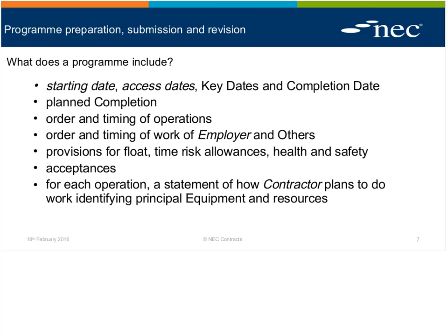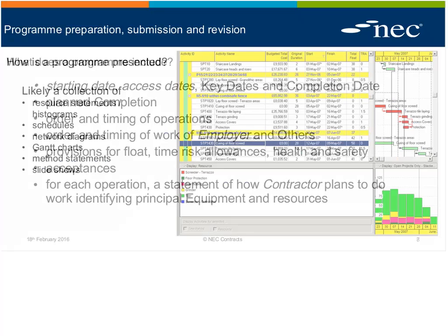On day one of a 2-year job, are you really going to know the nuts and bolts? How are you going to know, for example, the fencing? No, but if there's a piled retaining wall in the 100th week, I think we should know whether there's one rig or two. You know what you know. And you should show what you know. Why would you not show what you know?